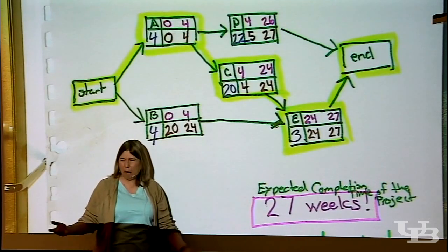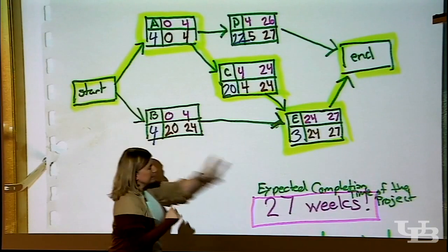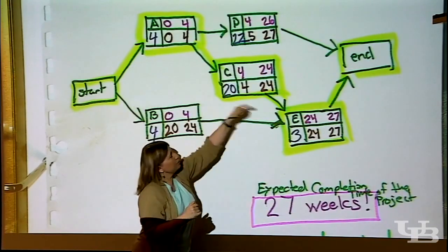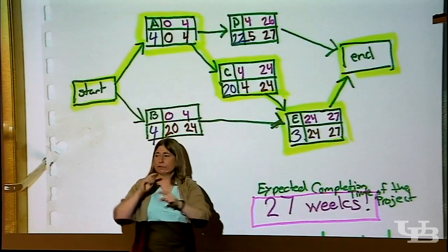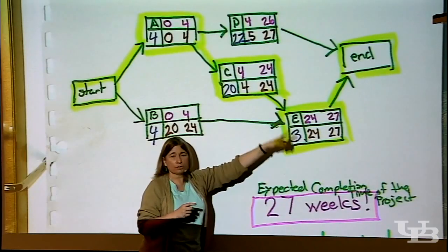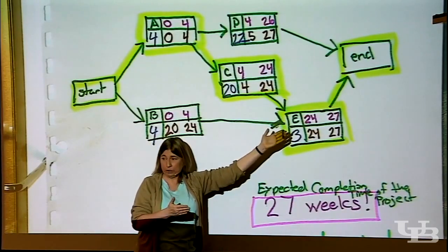You say, what? Why? Because it sees the problem of getting done within 29 weeks as the problem of getting threaded through each and every one of those paths in 29 weeks. Because yes, the project's not completed until you've successfully threaded your way through each one of those paths and reached the end, the finish line.